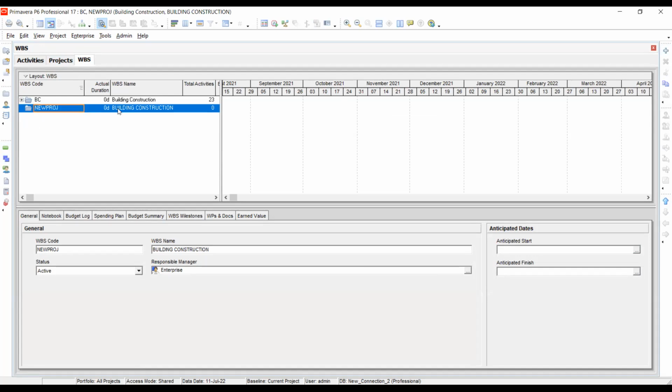We are going to start our work breakdown structure. Just go and see the PowerPoint presentation. In that I gave the work breakdown codes, WBS codes: foundation, external construction, then internal construction, services, plumbing, electrical works, and yard access.